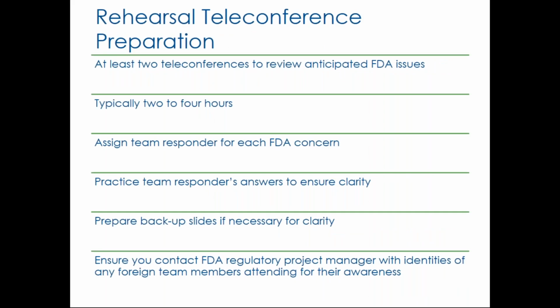So we generally recommend a minimum of 2 rehearsals to prepare for FDA. I usually like to devote at least a half a day for each one, a focus group of all the attendees who are going to be participating in the meeting. Before you receive FDA's preliminary written responses, you should still go through the exercise of looking at each question that you're posing to FDA and generate what you believe FDA's potential responses are, favorable as well as unfavorable, so that you can consider all the possibilities that FDA may respond with.